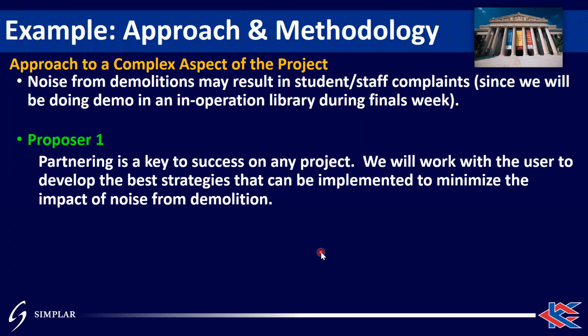The more cynical way I can interpret this response is they not only don't have a plan, but they're just going to come to the client and say, hey, client, what do you want us to do? And when the client responds to that question, the client now owns all the risk, and that proposer has not leveraged any of their expertise into how the project is going to be delivered. That's a problem, because in a predominantly qualifications-based selection, where the vast majority of the selection is purely qualifications and not on that 15% financial component, we're looking for your qualifications and your expertise.